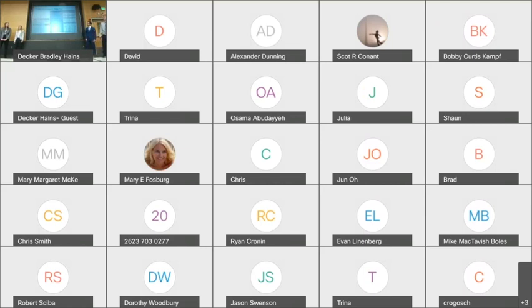Looking at the table on the right, those first 3 sections I highlighted just a couple of those major line items that are driving those costs. The bottom portion of the table, we have the full breakdown of the estimation of that connection to Paw Paw. As you see from those bottom 2 line items, it's going to take a little under a mile of pipe each for both water and sanitary to get to our site. And adding that into the necessary installations along the way, being the fire hydrants, sanitary sewer manholes, gate valves on top of the excavation of backfill. Total estimation for the connection of Paw Paw is about $1.14 million.